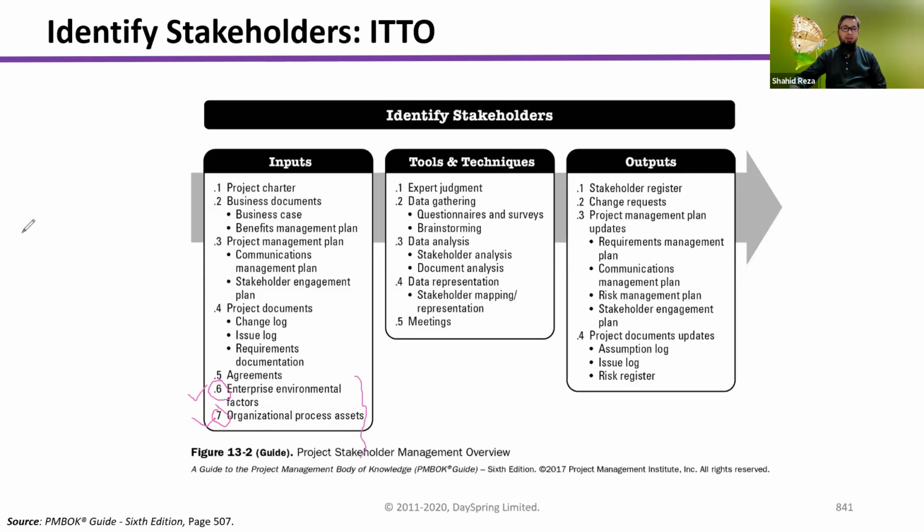Your stakeholder will be the city corporation, right? City corporation. Rajuk will be stakeholders. So their names need to be added here, in the stakeholder register. If you do not consider enterprise environmental factors, then you will miss these stakeholders.